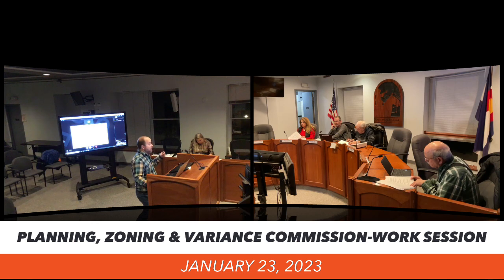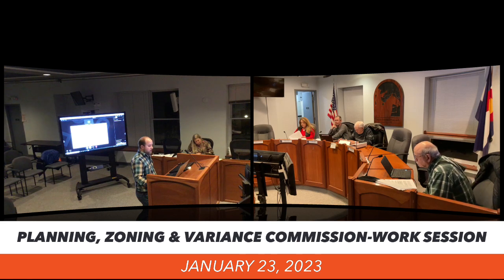A majority of the time when you're doing development, you're like, I don't know where the mains are. So it's really nice that the city already offers that on a Friday, to have you come in and meet with public works, meet with water utilities, so that they can say, here's where the main is in relation to your property, here's where you tap, or here's where you need to extend. So after that meeting, the manager shall classify the proposal as limited impact or major impact. That's when they make the determination, and at the same time, that's when they're telling them what will be required. You'll see that here in a little bit.